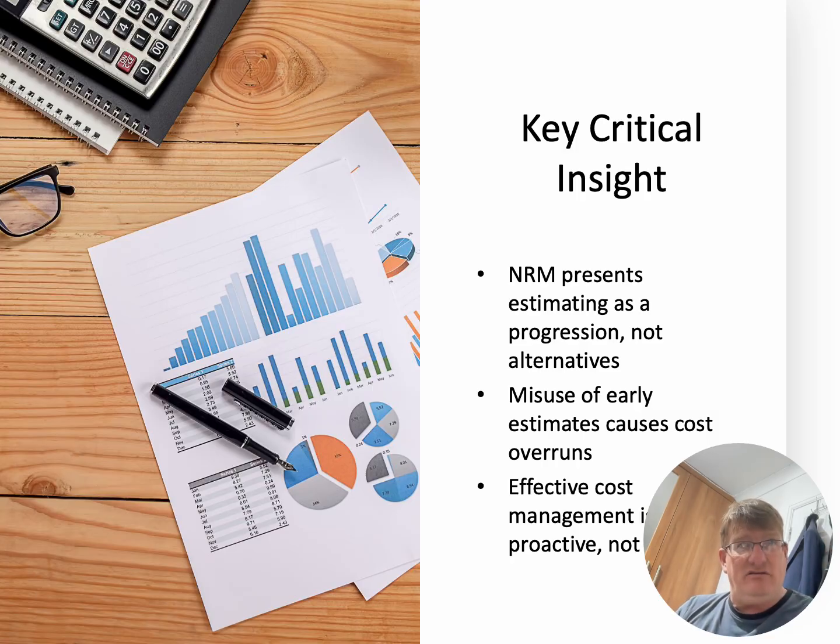You start at 0, you do the GIFA and a cost estimate, or functional floor area and a cost estimate, and then as the information becomes more detailed, as the design starts to take shape, as the issues with the design start to get identified, your budgets start to become more accurate, because they reflect all that's going on within that design stage, all that's going on basically in the RIBA plan of works, if you read it in those early design parts of it, okay.